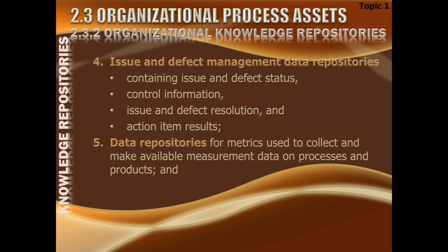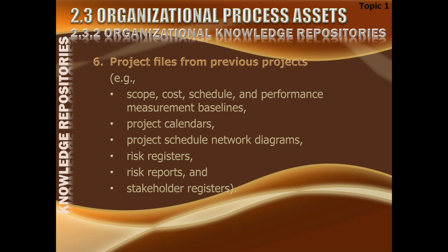Issue and defect management data repositories will contain the issue and defect status, control information, issue and defect resolution, action item results, etc. Data repositories for metrics used to collect and make available measurement data on processes and products, and project files from previous projects, which could include any document about scope, time, cost, performance measurement baseline, any of the baselines, project calendars, project schedule network diagram, risk registers, risk reports, stakeholder registers, etc.